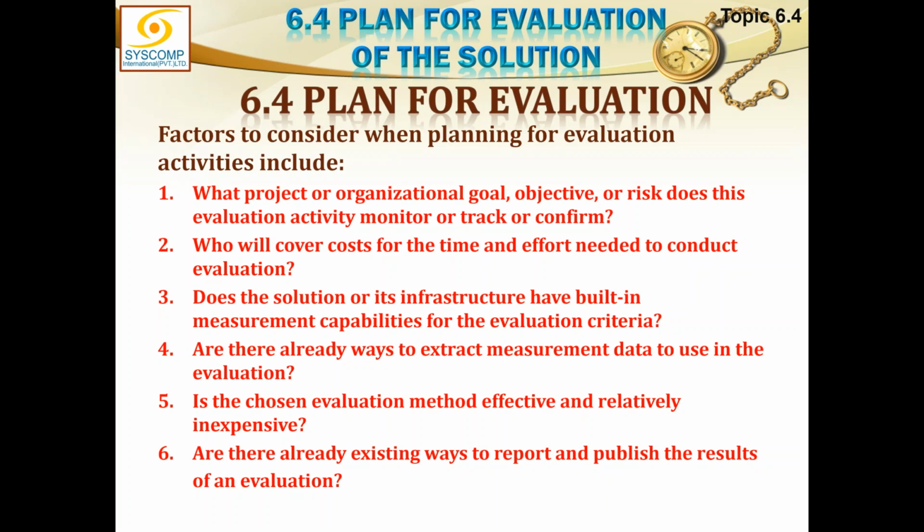Third, does the solution or its infrastructure have built-in measurement capabilities for the evaluation criteria? Four, are there already ways to extract measurement data to use in the evaluation? Fifth, is the chosen evaluation method effective and relatively inexpensive? And last, are there already existing ways to report and publish the results of an evaluation?